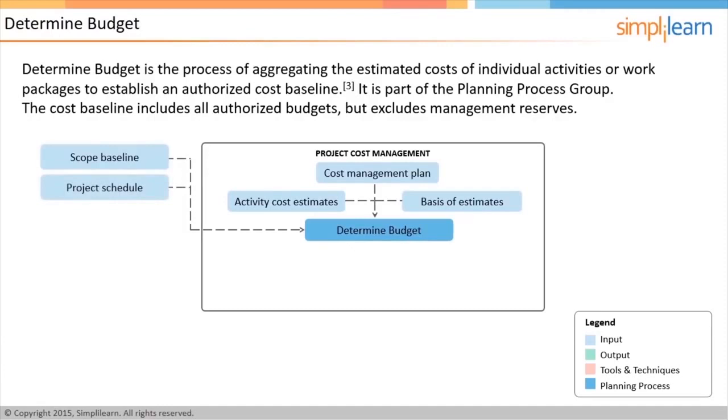Project schedule provides aggregate cost in a particular calendar period to ensure how much money can be made available during that time. Similarly, resource calendar provides information on the resource which is assigned to the project at a particular point of time. This information is then used to indicate resource costs over the duration of the project. Risk register gives an understanding of the overall level of risk on the project and, therefore, the level of contingency reserves that need to be built into the budget.